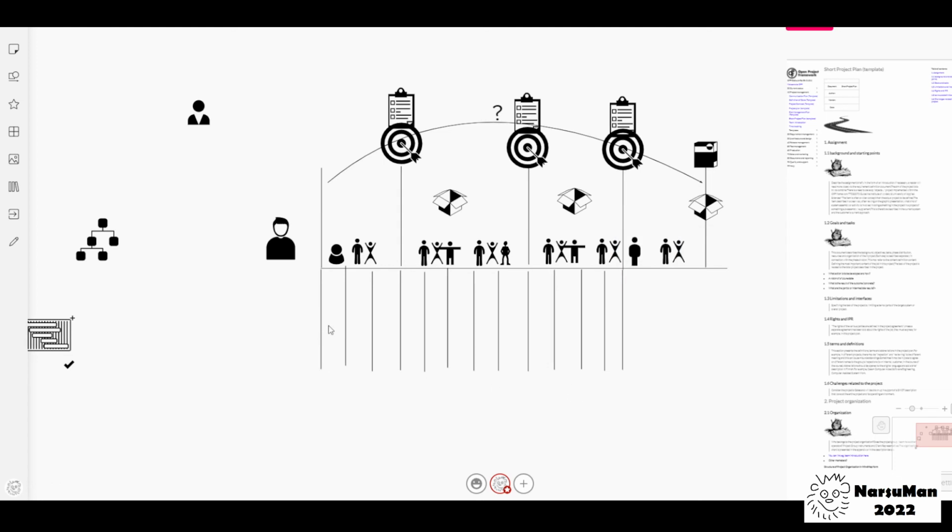So we split this project time into certain periods of time. One sprint is a 2 or 3 week period. It depends. In this course it's 1 week, but you have to make this splitting beforehand, so you can fix the dates and days with the gates or goals, and make sure that you know that if this is sprint 0, 1, 2, 3, then in sprint 3 there is goal 1, and 4, 5, 6, 7, 8, there is goal 2.